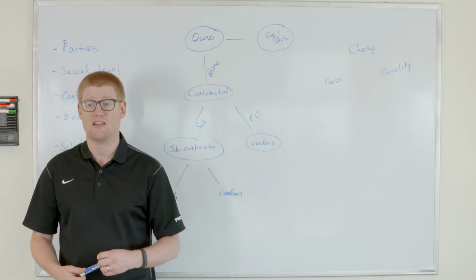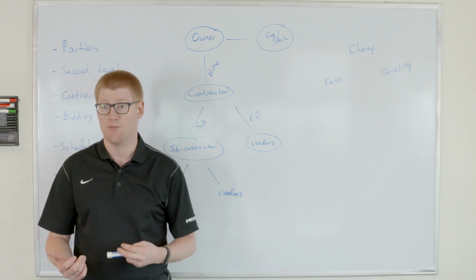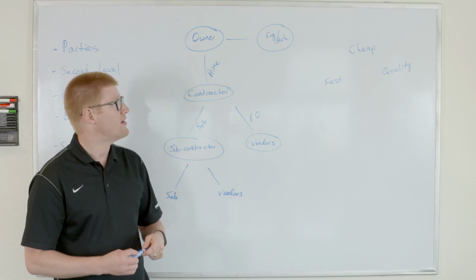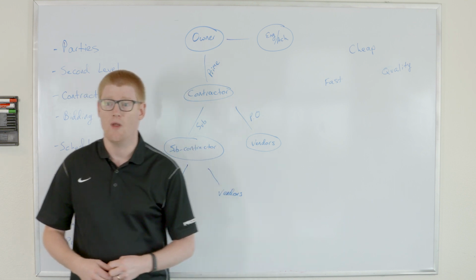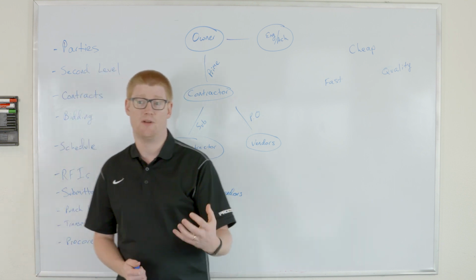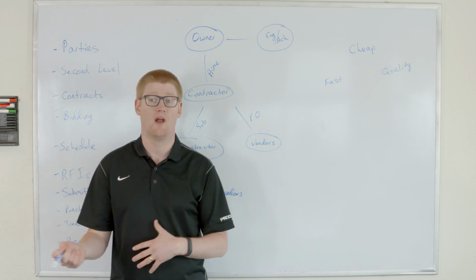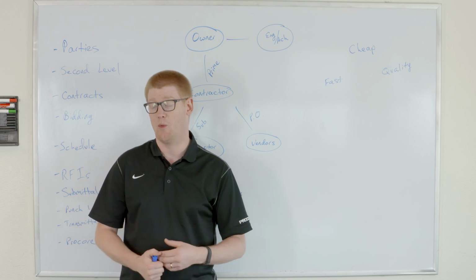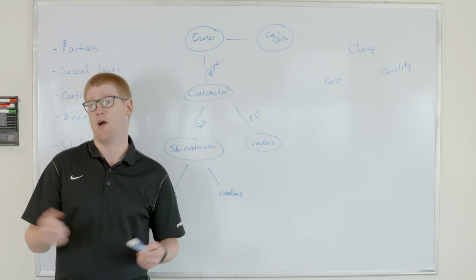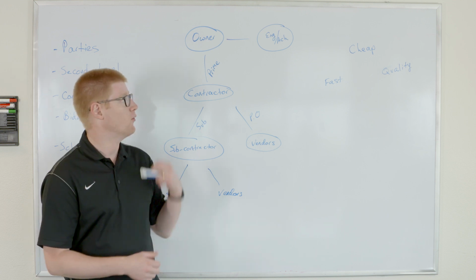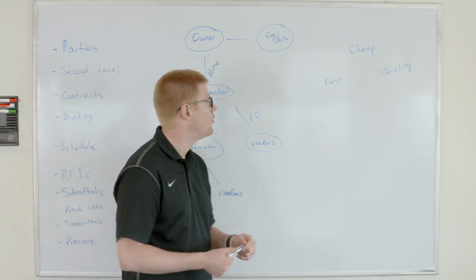And so in that case, it's more advantageous for me to have it fast, even at the expense of having a more expensive project. On the flip side, if I was having a residential house built, I may be really after that cheapest level of the house, and it may not matter to me as much that it's done quickly. It's more that it's cheap and high quality. So it really depends on what you're looking for and what type of project you have as far as where your priorities lie along those three objectives.